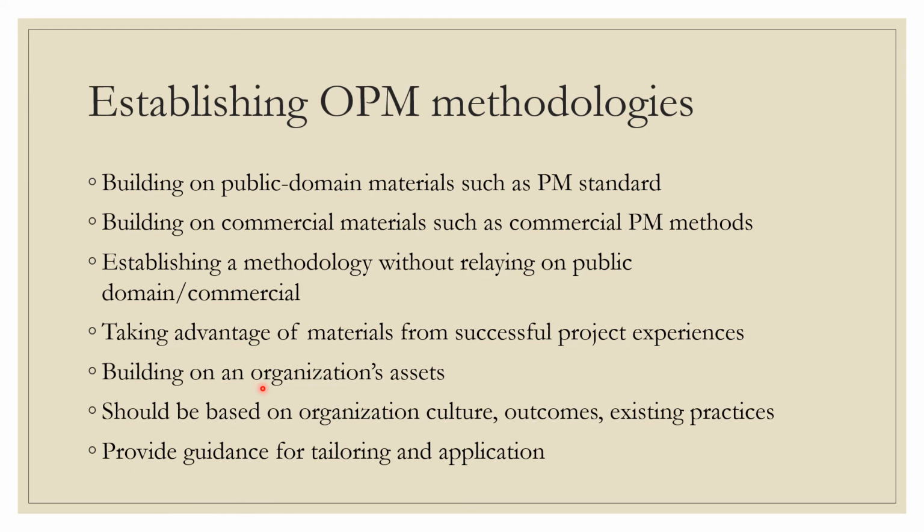How do we establish OPM methodologies? What is the approach we can take in establishing OPM methodologies? There are a number of approaches you can take. You can build on public domain materials such as PMI standards or project management standards. You can build on commercial materials like commercial PM methods. Alright. Or you can establish a methodology without relying on public domain or commercial materials. It can be unique in nature, right?